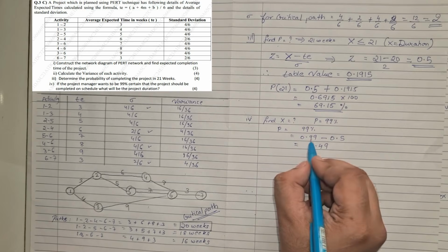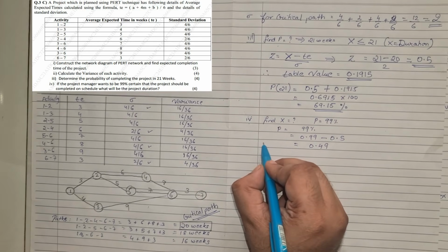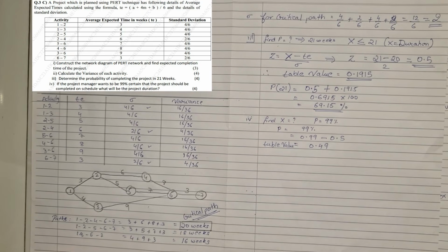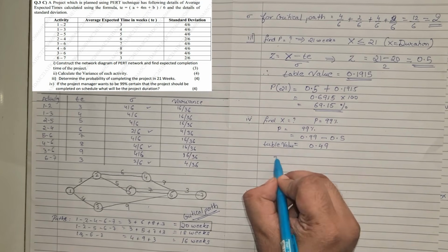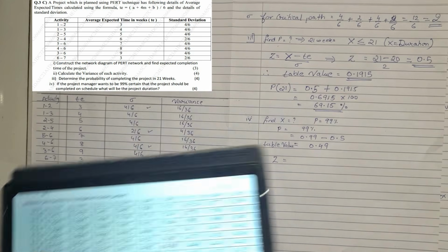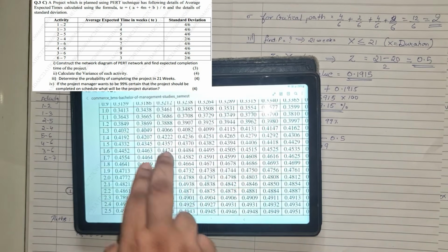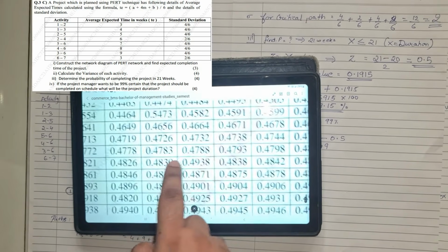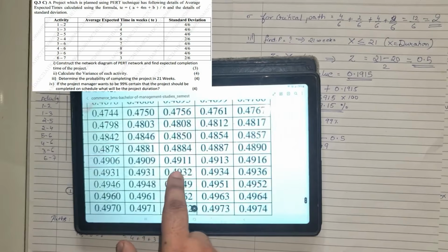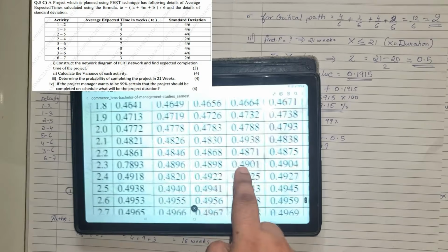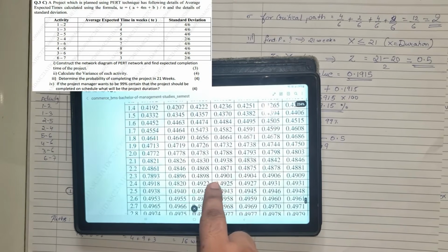That is the probability value, also known as the table value. So we need to search for the Z that corresponds to this table value. We need to find Z from 0.49, whatever we have got. I'll remove that chart and you see where 0.49 is in that chart. We need 0.49 or a number which is close to it. This is the closest value to 0.49.